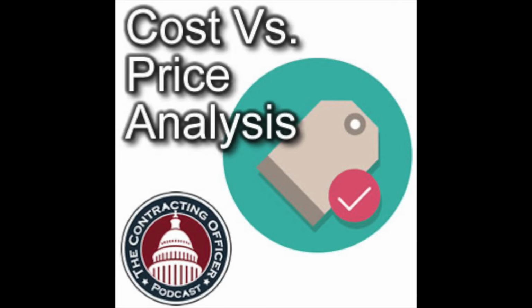In this case, they're saying if they developed this one item and they built one of them last time, but now they're building a production line, the circumstances have changed. That's why it ends up being cost analysis, because you're looking through a different lens. Right. It used to cost a whole lot because I had a whole bunch of people sewing these things by hand. Now a machine does that, right? So you can't just say because it used to cost this, that's fine. You have to understand why this matters for your specific circumstances.